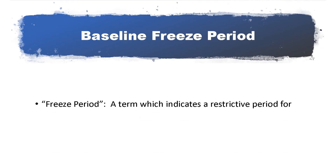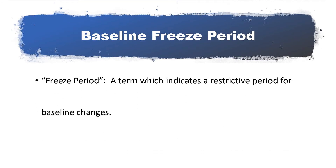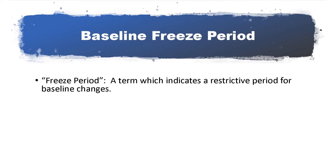The Performance Measurement Baseline, or PMB, represents the time-phased plan against which performance is measured. For this measurement to provide meaningful information which can be used for decision-making, it must directly tie to the authorized scope of work and represent the current execution plan for the project. Having a disciplined change control process helps to ensure that these goals are met.